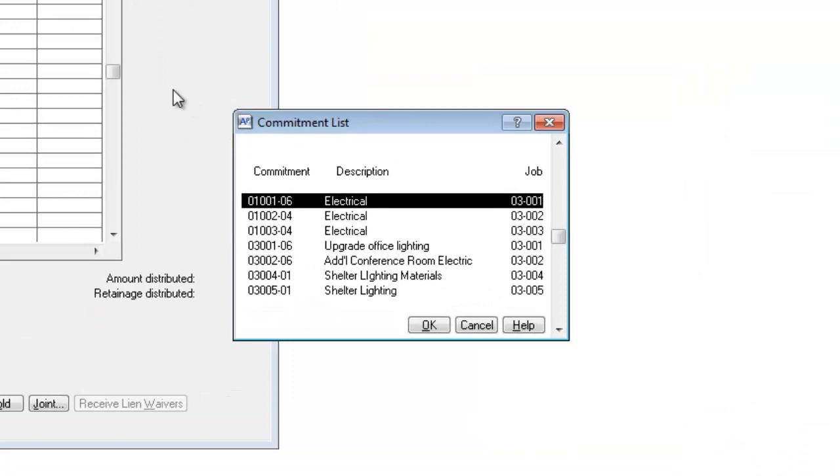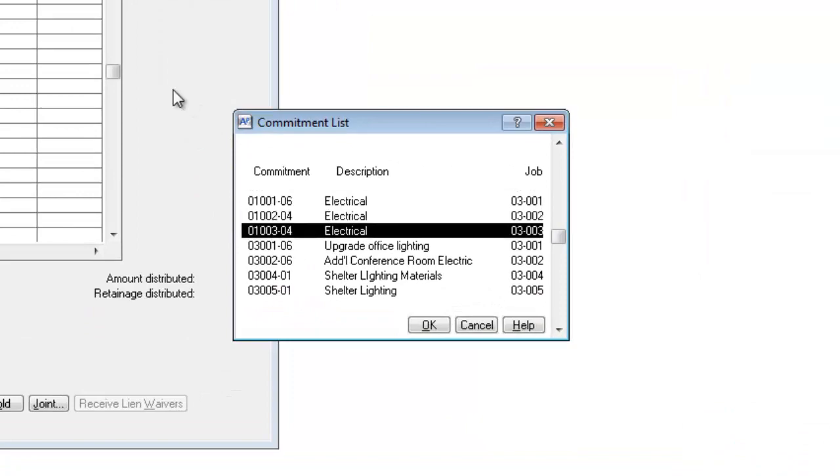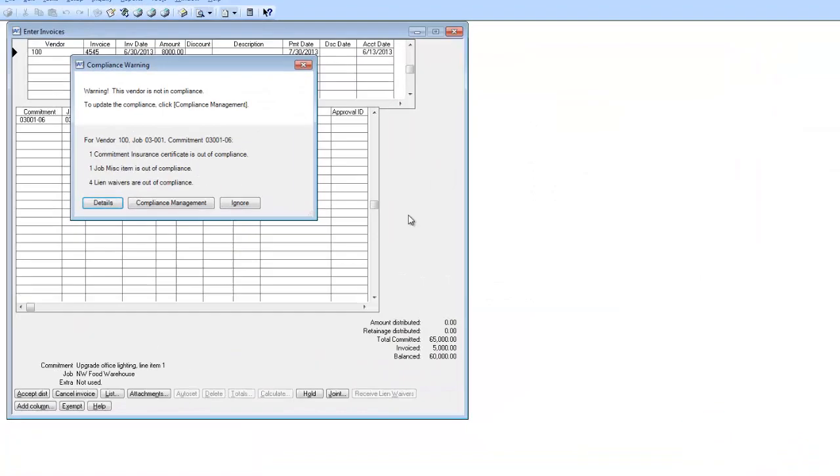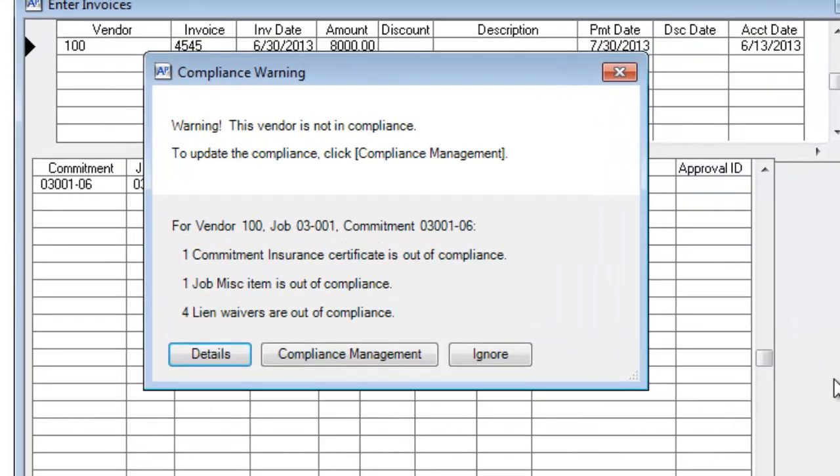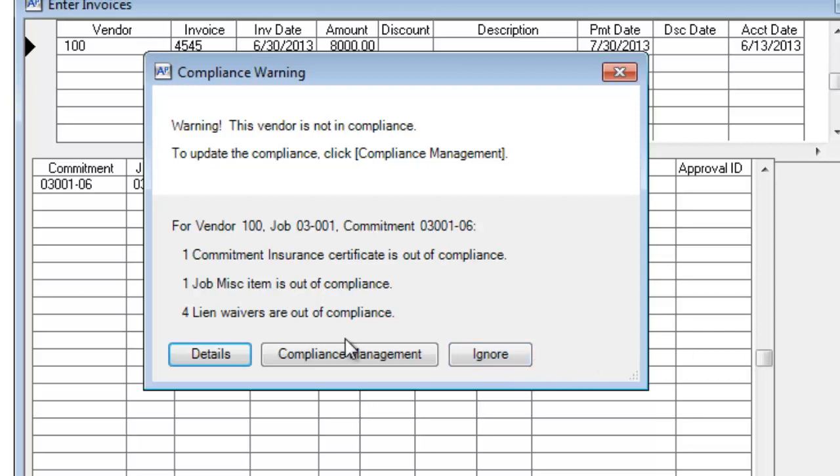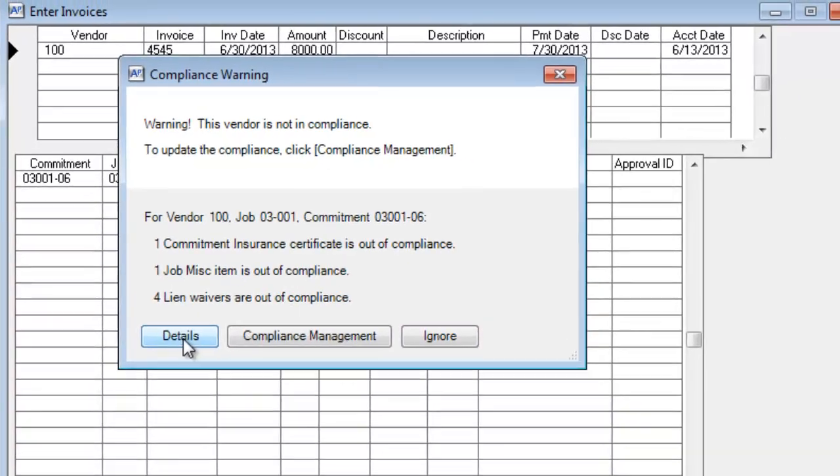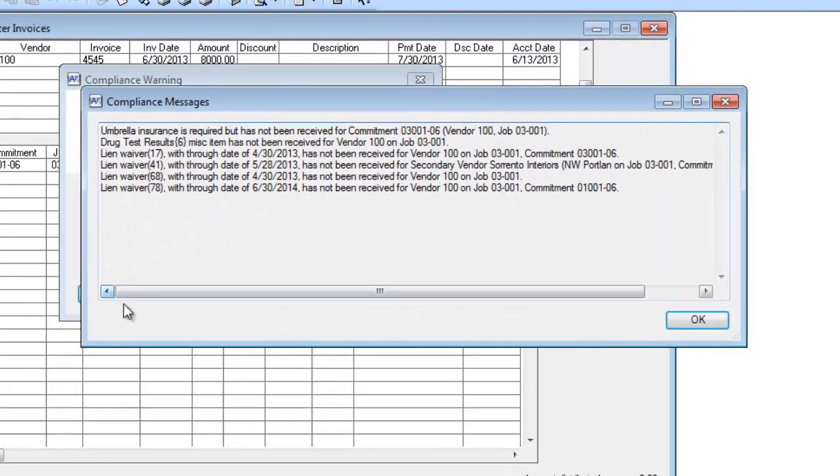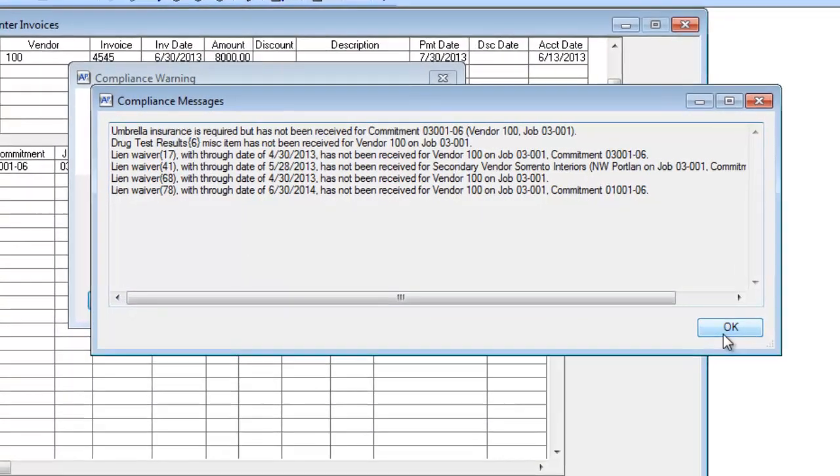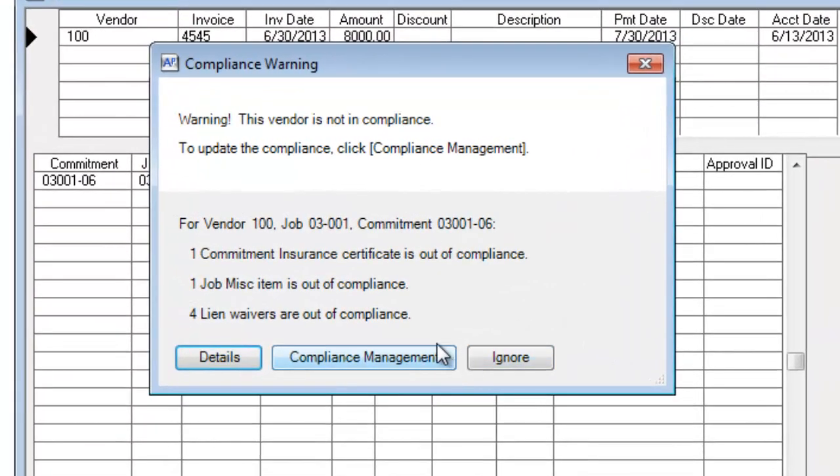I'm going to pick the commitment. And right now, it's telling me that in addition to having insurance out of compliance, I have four lien waivers I need and a miscellaneous compliance item that's associated with this commitment. Again, I can click the Details button and get more information, or I can open the Compliance Management window, or I can choose to ignore.